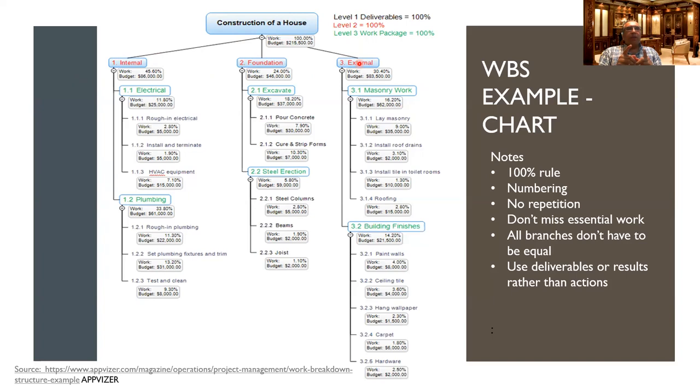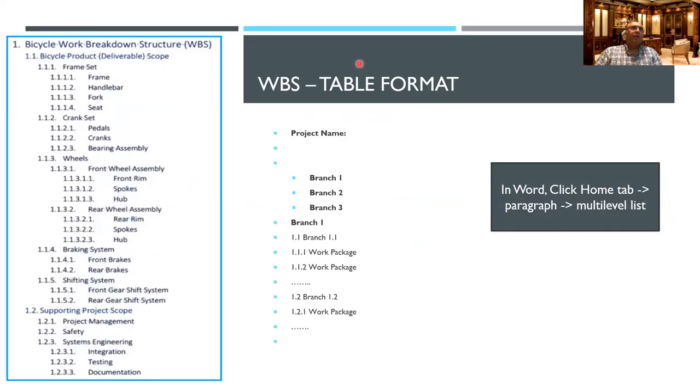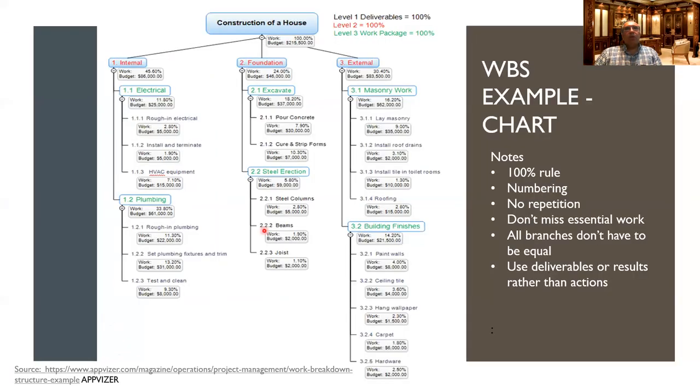One thing should be added here also, which was in the next one. In this one, we have it here. You can see the project management activities are also added, because from day one, you don't start working on the house. You first have to do planning, right? You have to have the project charter. You have to remember the project management plan has all those plans in it. It will take you some time, effort, and cost to make all those documents. So you should add that in your WBS also as one activity. This is the minimum, at least it shows the actual work you will do, but that is an additional thing that should be there.